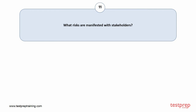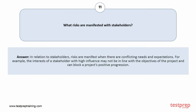Question number 11: Your answer is: In relation to stakeholders, risks are manifest when there are conflicting needs and expectations. For example, the interests of a stakeholder with high influence may not be in line with the objectives of the project and can block a project's positive progression.